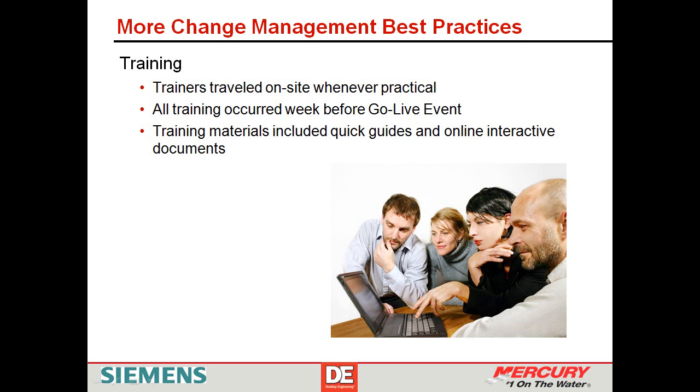From a training standpoint, we had the members of the PLM team go to the different sites and work with the users live where we could, so we had face-to-face contact. And then we also came up with training materials. We had quick guides, which were quick desk references, and then we also had online interactive documents. With that said, the process definition portion of our deployment took about 6 months, with the configuration and go-live portions taking roughly 3 months.